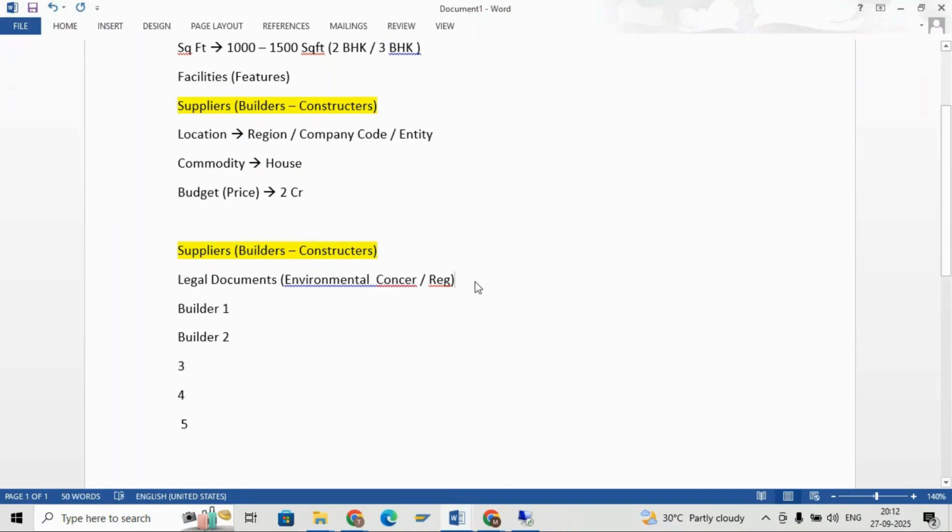So here you will not bother about money, you will not check anything. First thing, you will see their history, number of employees, who the owner is, when they were founded, and what locations they work across. So those things you will inquire. That is the first type of screening. That first type of screening we call RFI, request for information. In Ariba, we are using this RFI. It is something where you are analyzing non-competitive data, non-competitive meaning without price.